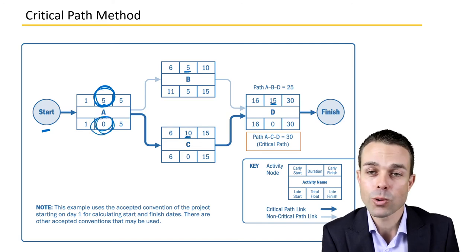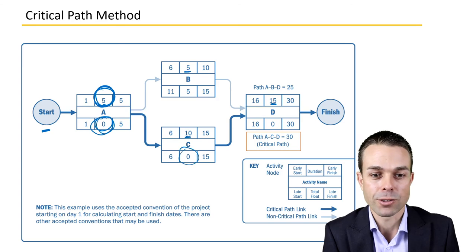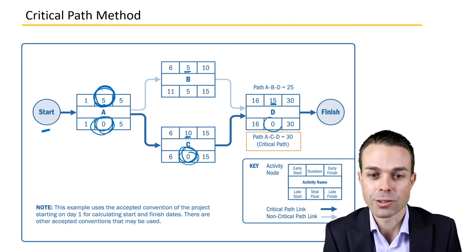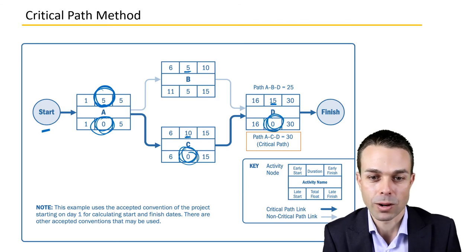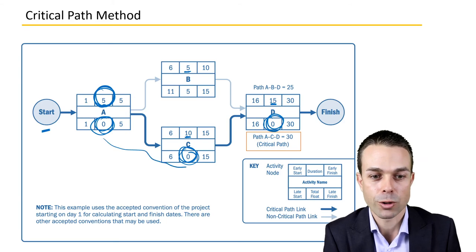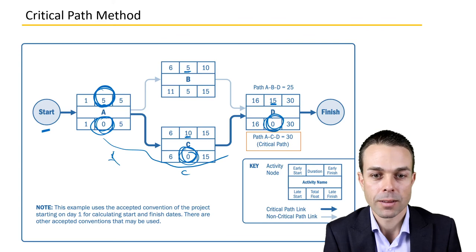So we've got zero days of float. So there's no leeway for this one. There's no leeway for this one. And there's no leeway for this one. So that means our critical path is A, C and D.